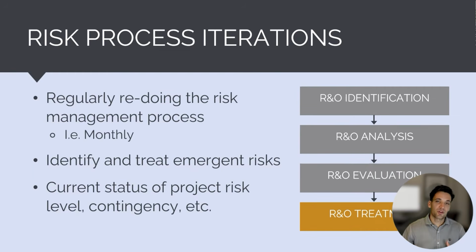The key, when we're talking about monitoring and controlling in risk management, is just to iterate through the risk process, iterate through the entire risk management process. We constantly want to be cycling through identifying, analyzing, evaluating, treating, and then assessing how effectively these treatments are working.